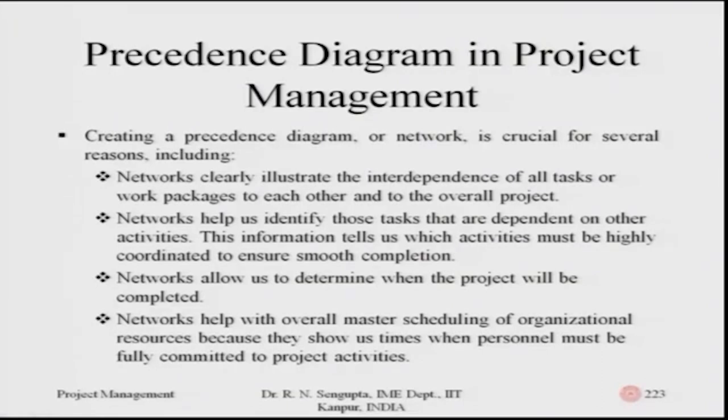Networks clearly illustrate the interdependence of all tasks or work packages to each other and to the overall project completion. Networks help us identify those tasks that are dependent on one another or on other activities. This information tells us which activities might need to be highly coordinated to ensure smooth coordination and end of the work. Networks allow us to determine when the project will be completed, and networks also help us with overall master scheduling of the organizational resources, because they show us times when personnel must be fully committed to finish the project work as required.